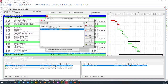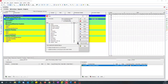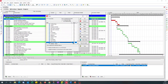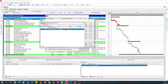Because this field contains activity IDs and other information, we have to think of a way of just extracting the lag information. Lags and leads normally come as numbers — positive for lag, negative for leads. It's a user-defined filter, which can apply to the project schedules, or you can make it global if you have the rights. Because this field contains other details apart from the lag information, we can't use 'equals' — we use 'contains', looking for substrings.